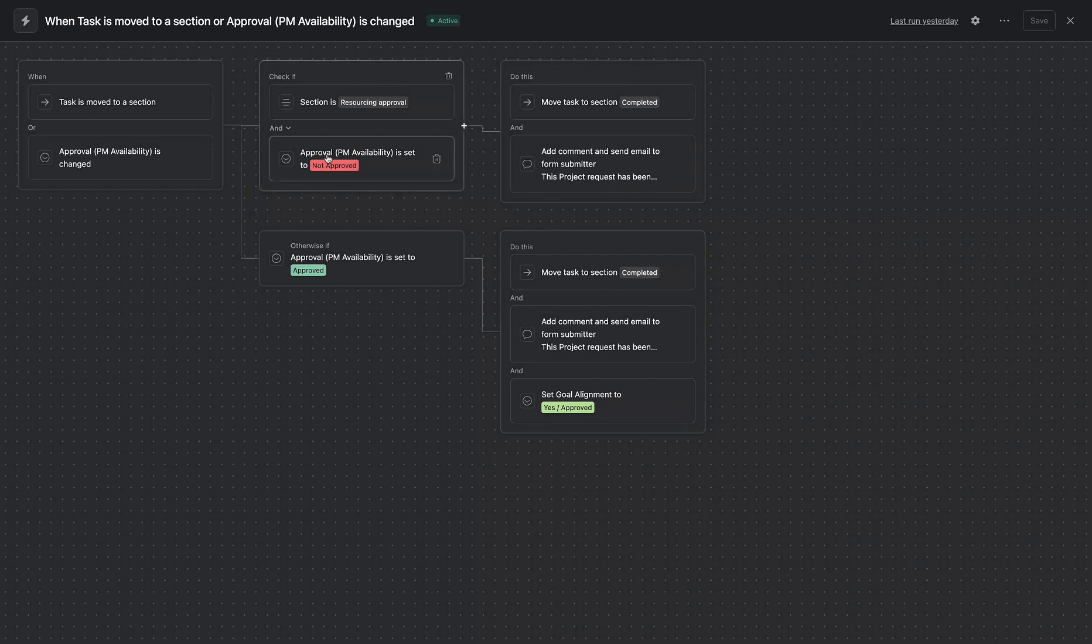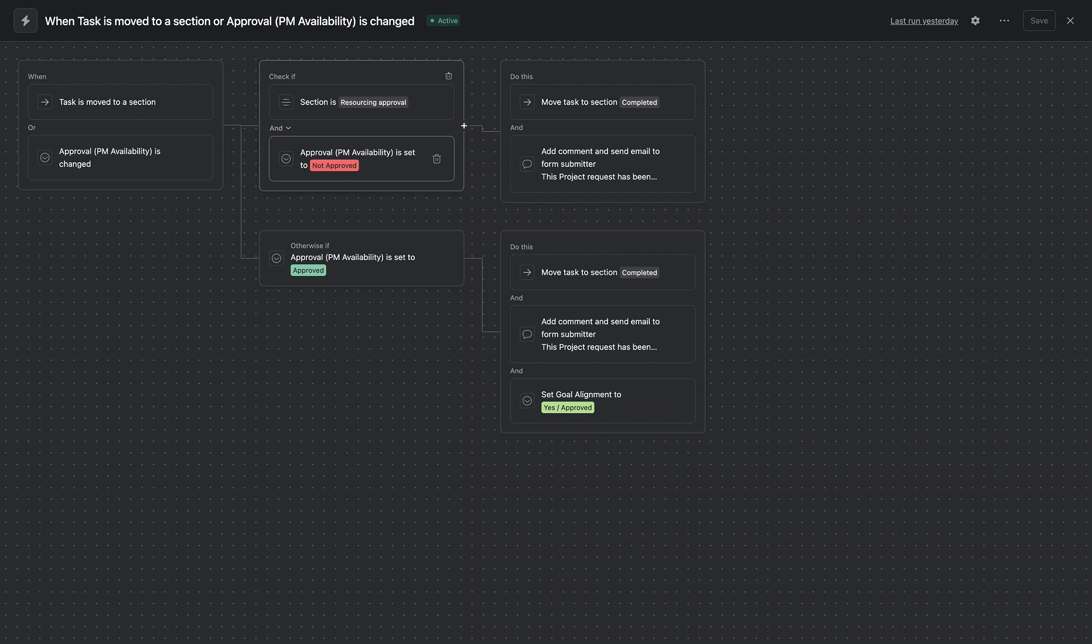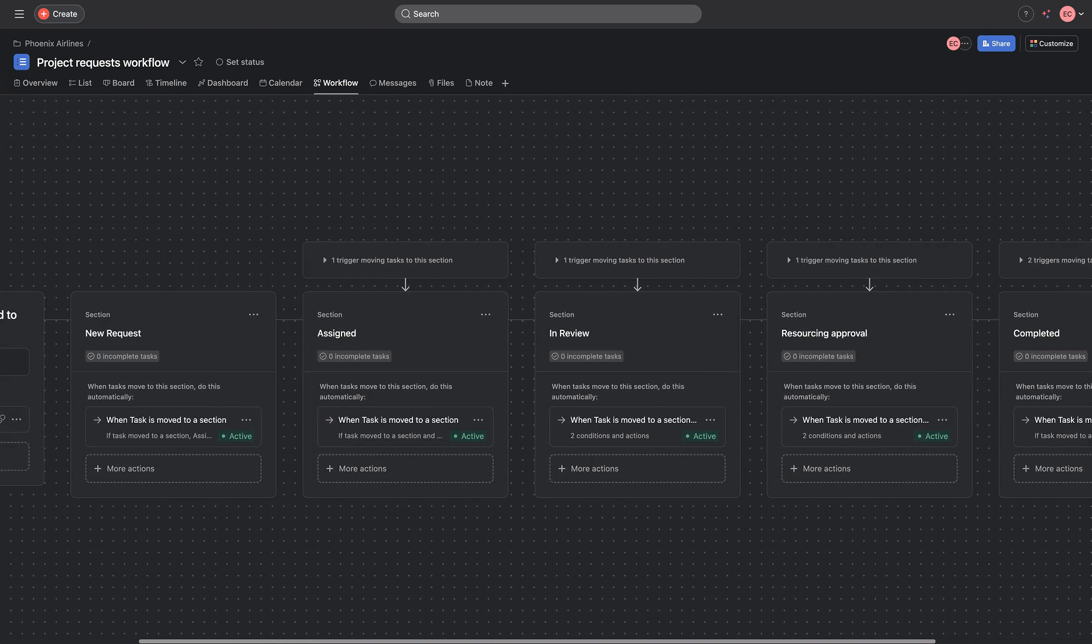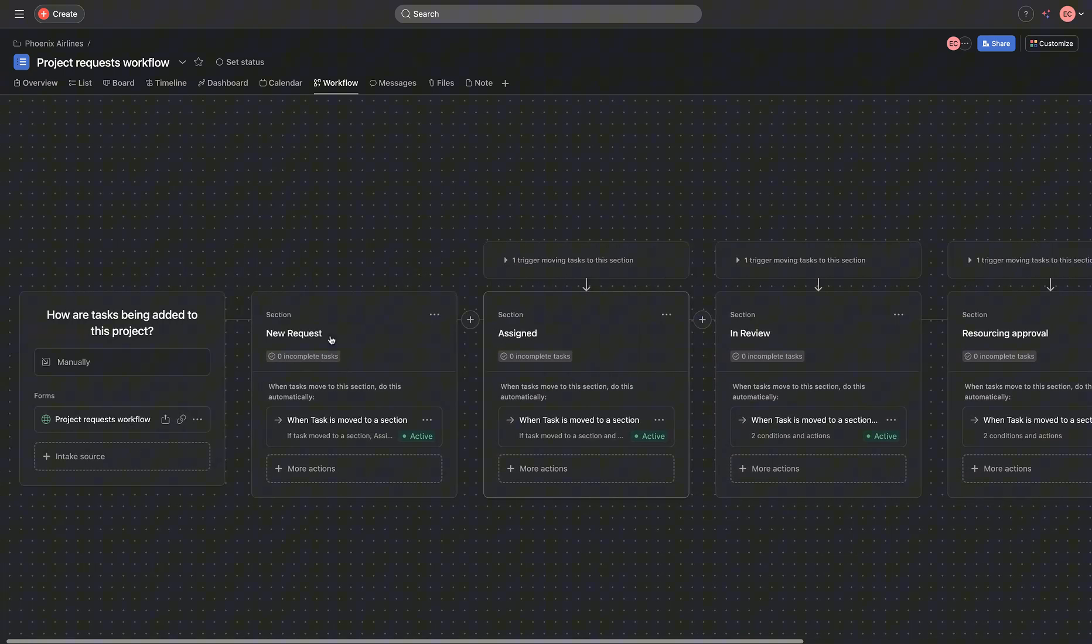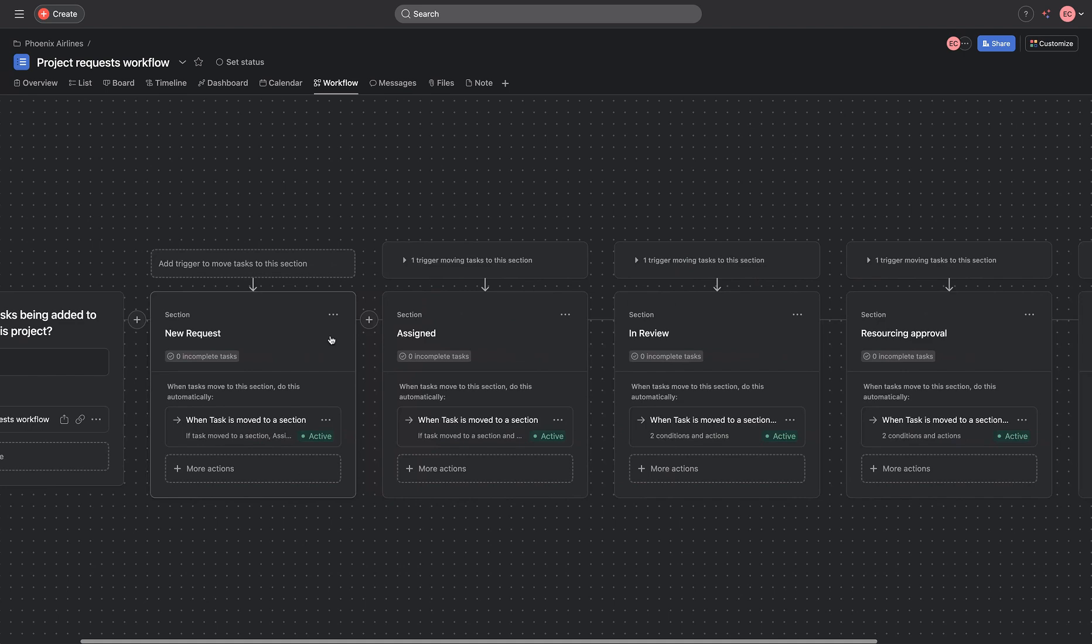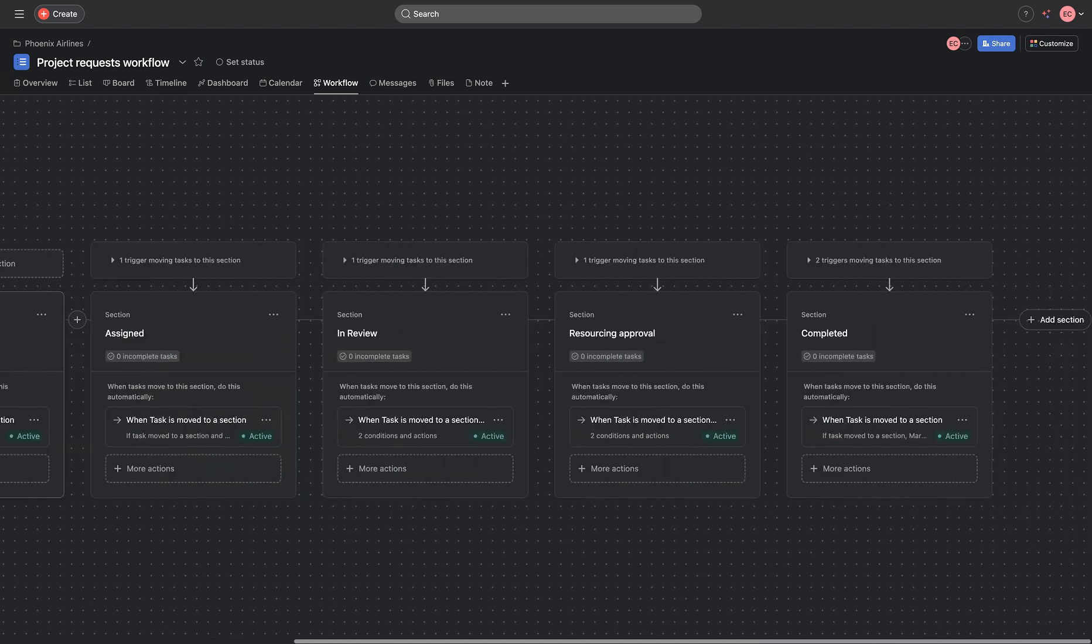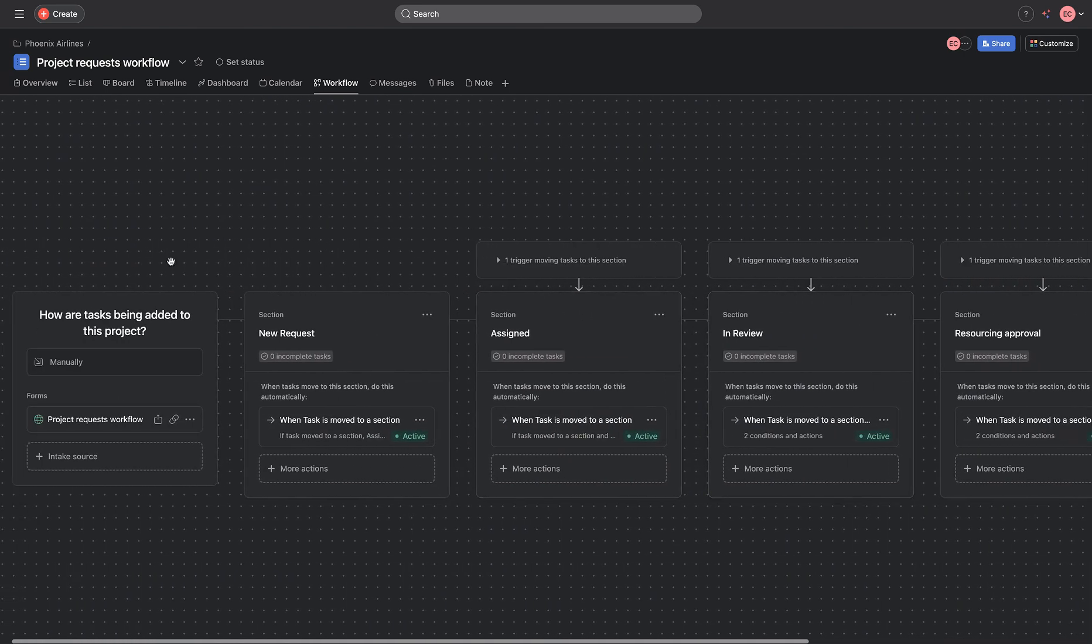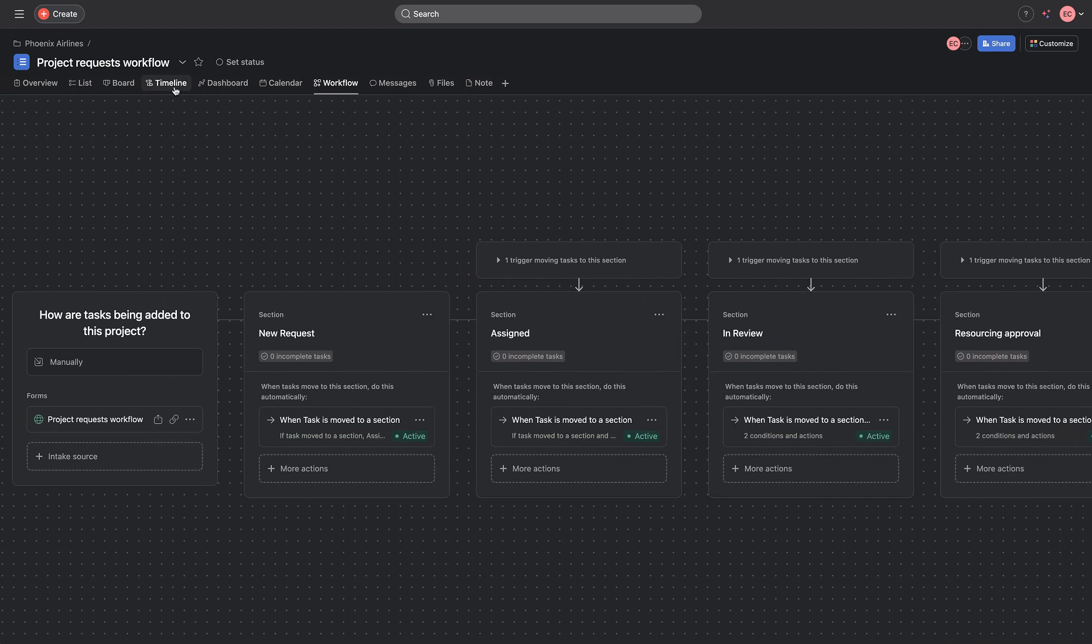At the next phase, we figure out if the project request is reviewed, and we look for available project managers. And if we can find one, this project is automatically approved, else this project will be rejected. So this makes the approval of a project request to be easier. And we spend a very small amount of time reviewing projects, we don't have to manually do every single thing. That is the reason we have this particular automation for this workflow.